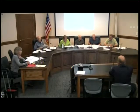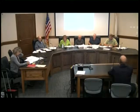Right. There's still no way to issue a partial certificate of compliance for the entire subdivision because it's not in full compliance. Right. But on this particular lot, it is. So how do we state that? We can state that. We've typed many things in that partial certificate of compliance. The last one stated it was only the house, so it was very clear. So this one will state that all work related to the crossing, wetland replication, flood storage, whatever you wanted to say, on this lot is in compliance.